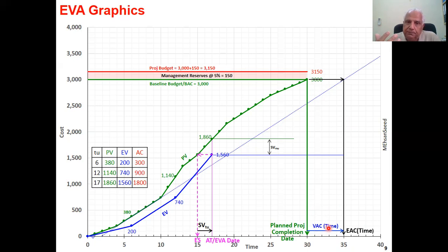So that was time. Let us now take cost and plot actual cost. Here we are. Again, just by looking at this graph, we find that the red line is above the blue line. In other words, we are earning less and spending more. A clear indication that we are over budget. So that is the beauty of creating a chart and not taking tabulated data.